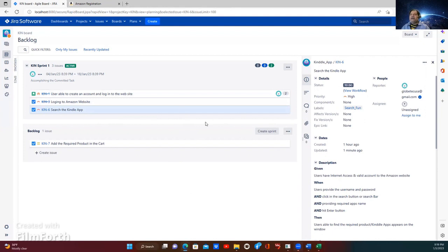So let's say next sprint our workload is 15 points. And then we have to add these 3 points to that sprint, which has now become 18 points. So before starting a new sprint, we need to look over whether any story needs to be carried over or not. You have to count those points, and then add new user stories within your team capabilities.